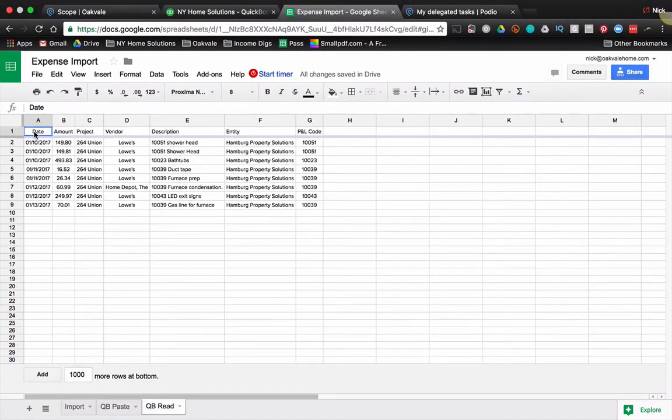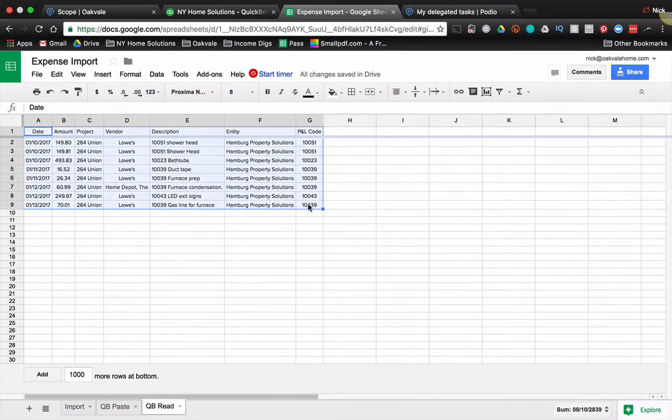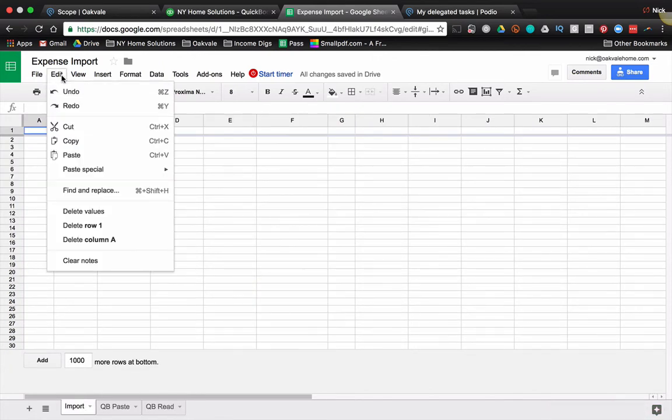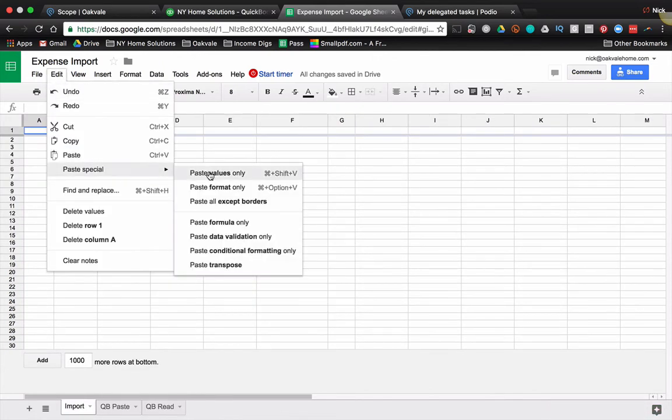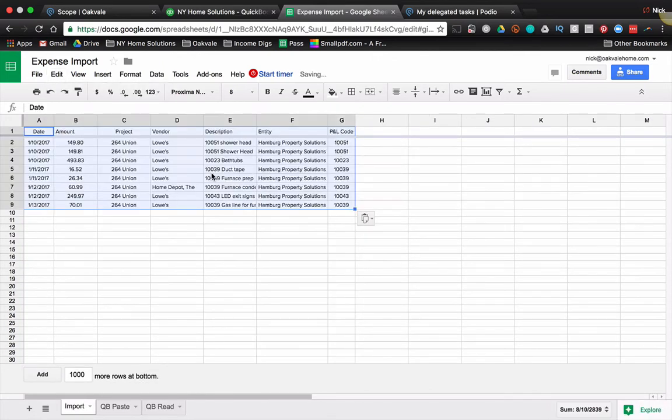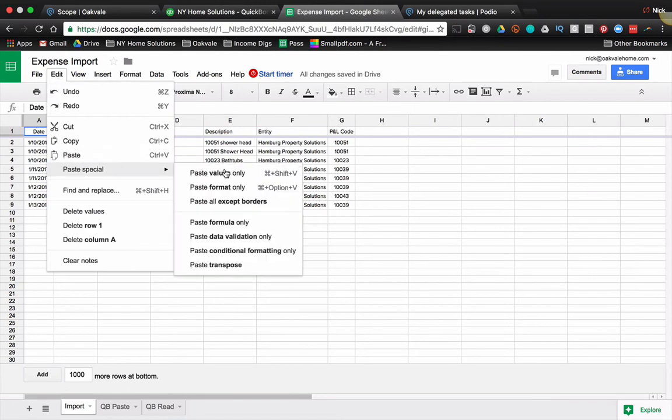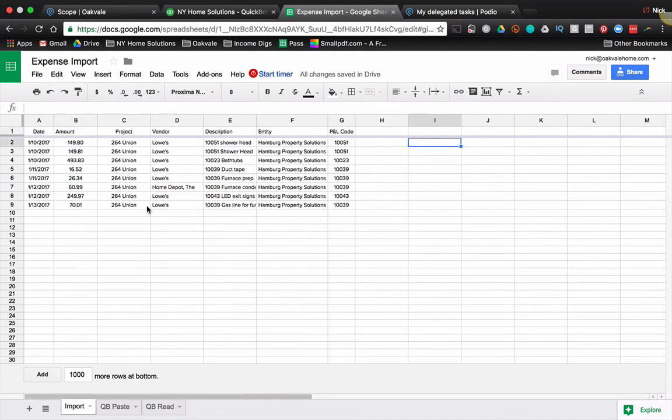Now one last step before I import, I got to go grab this and copy and paste the values. The reason for that is Podio does not like when you try to import Excel stuff that has formulas, it won't read it. So I paste special values only. Now this is ready to import.